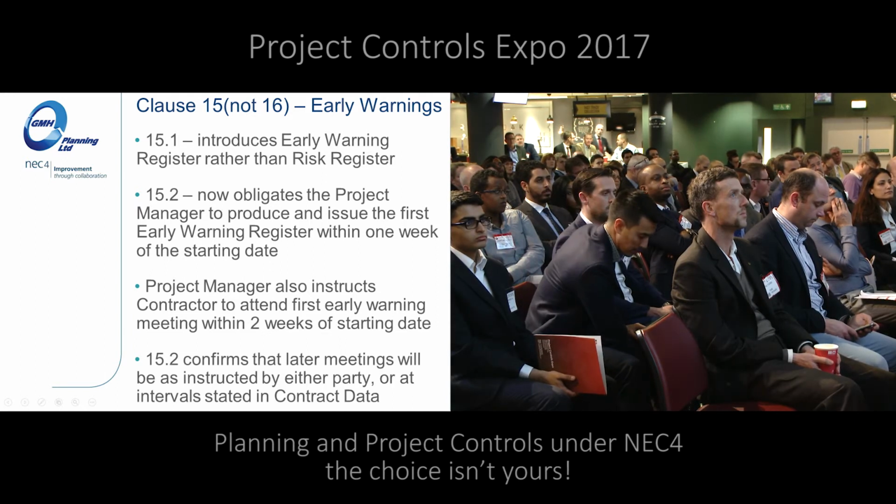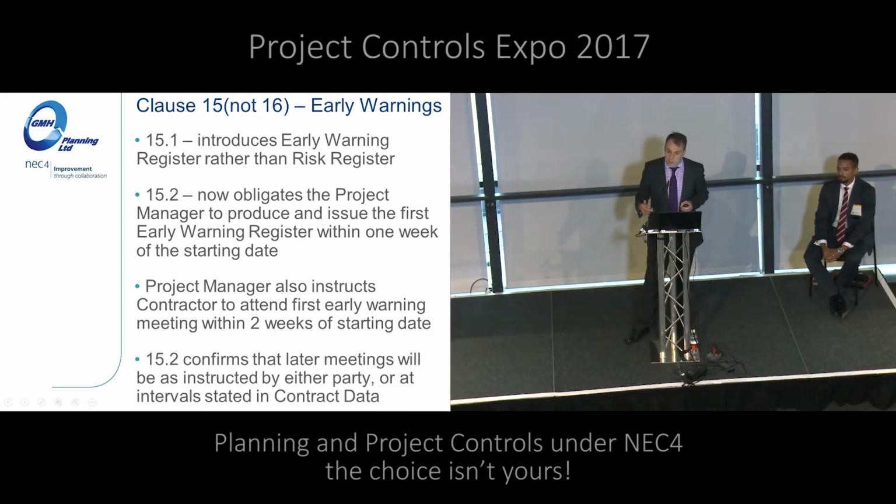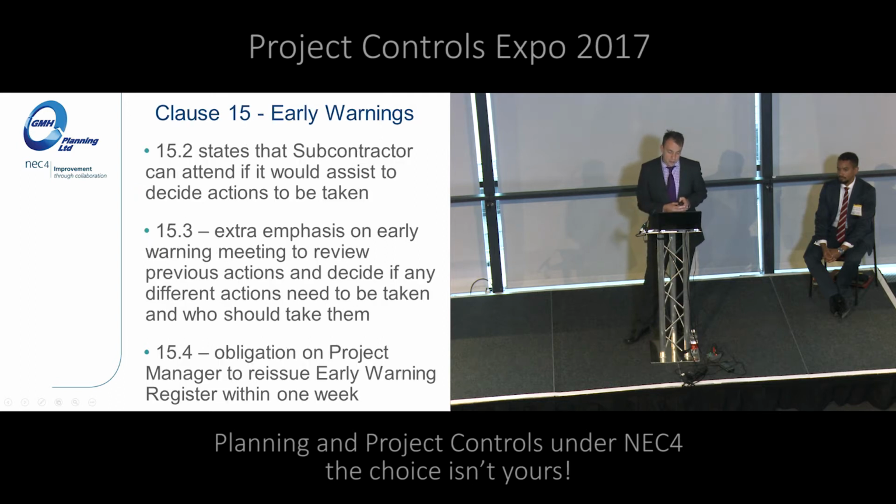15.2 confirms that later meetings will be instructed by either party or at the intervals stated in contract data. Another nice little element we've got now, so you can have an early warning meeting interval stated within contract data to encourage the regular happening of those meetings. Again, subtle points of clarity. 15.2 tells us subcontractors can attend if they would assist with the decision. You'd like to think, well, we'll probably do that anyway, but it encourages that.